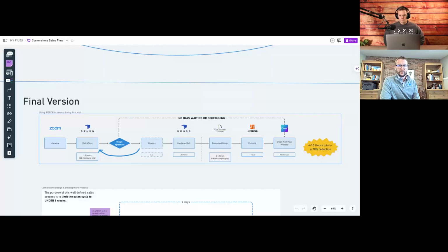And one of the notes that we'll put in is like, hey, look, this allowance is $55,000 for your cabinets. If you went with regular full overlay cabinets, your allowance would be 35. Let them do the math, right? But they know within reason, plus or minus 10%, with that first pass proposal, if they stuck within those allowances, that's exactly what they're going to spend on that project, right?